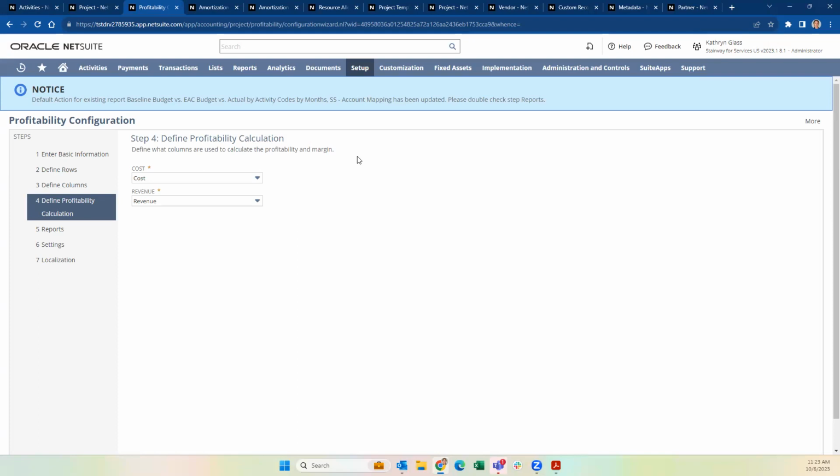Whatever the cost is to produce that, we'll keep track of that. And that's pretty cool, the committed and then the actual cost, we can do that. But we would earn a royalty rate that would burn that down. It would be at, say, 25% until we recoup our cost. And then as we pay out to that author, it would bump up to 40% of our revenue. Okay.